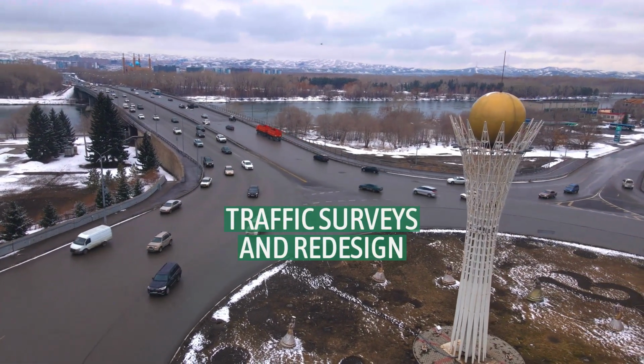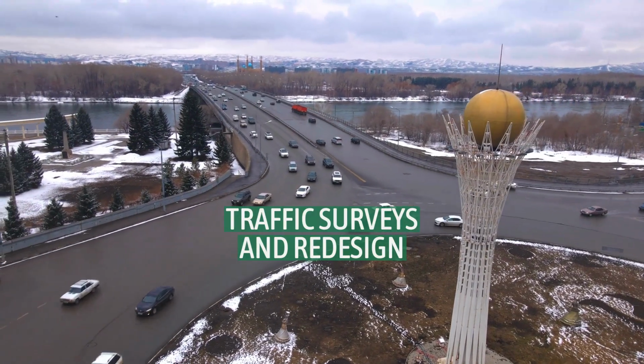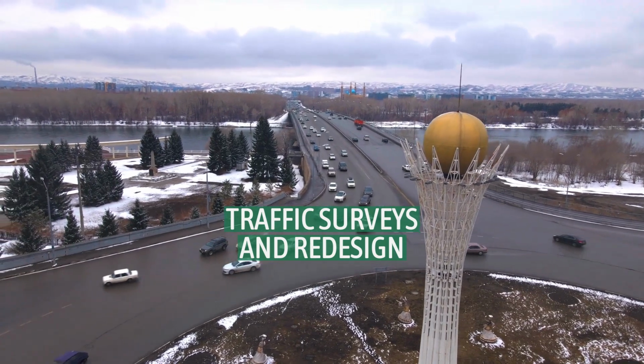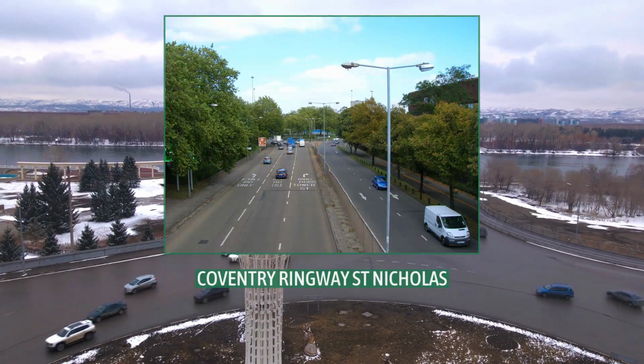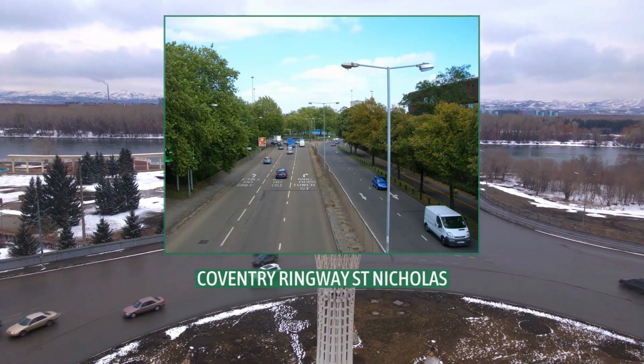By 1960, despite Stage 1 being open and Stage 2 underway, the council realized that it needed a better understanding of Coventry's long-term traffic requirements. There was little vehicle movement data recorded at the time, and theory for large-scale car use in cities was not well developed. The council therefore carried out a survey to establish traffic patterns.